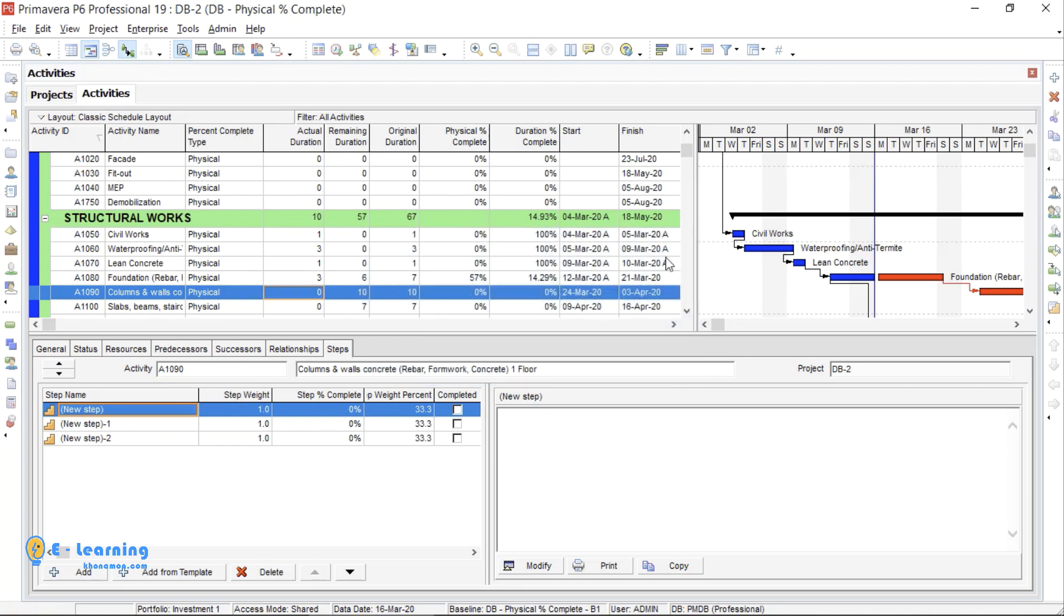The weakness of this type is, you can just see the activity progress, not overall or WBS progress. When the activity's progress is important for you, it is a good and easy choice.